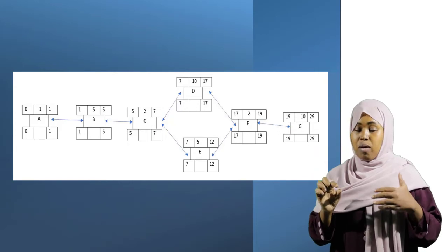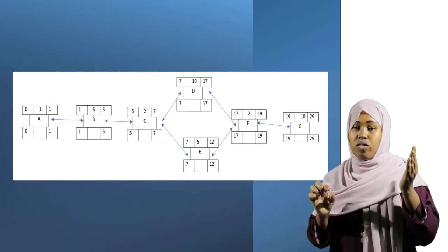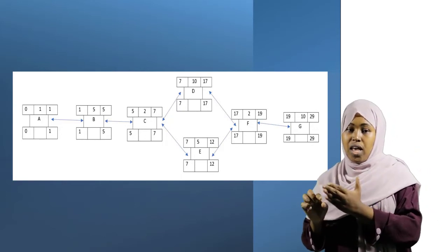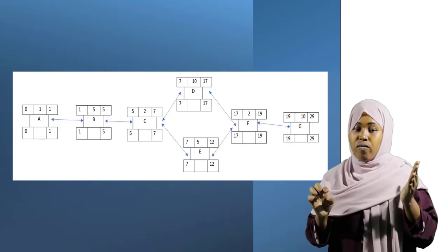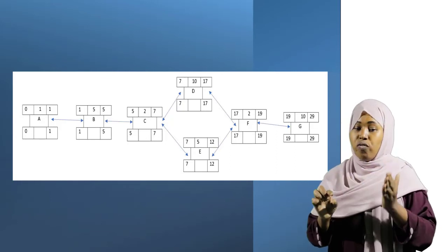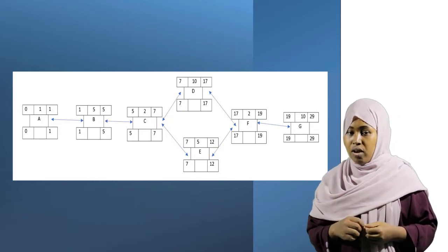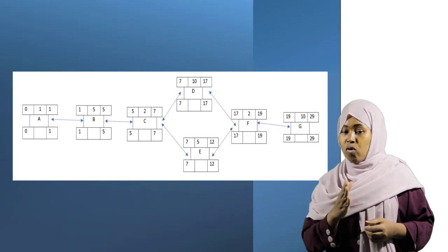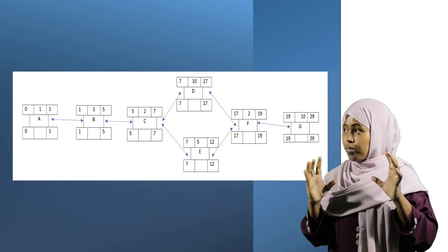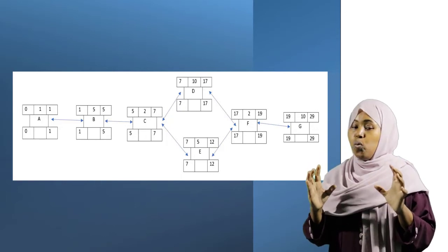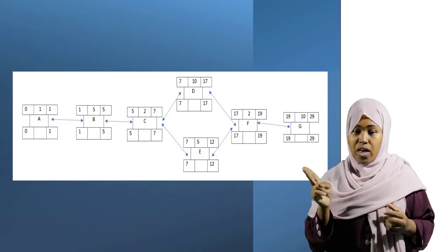As I mentioned before, the critical path index shows you every activity and the sequence in which the activities are to be implemented. The first activity and the second activity will finish, so the first, the second, up to C, you need to finish one by one. When you come to E and D, you can run them in parallel. And then E and F will be in sequence. When you see this illustration, you can easily understand which activity is first and which activity is the end. And so we have two paths here.